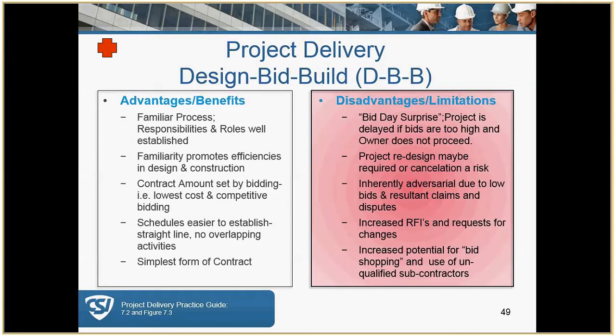And then we have the disadvantages. Bid day surprise: the project is delayed if the bids are too high and the owner does not proceed. A redesign might be required, and for those of you designers out there, A&Es, a lot of times in the past there was no additional fee.